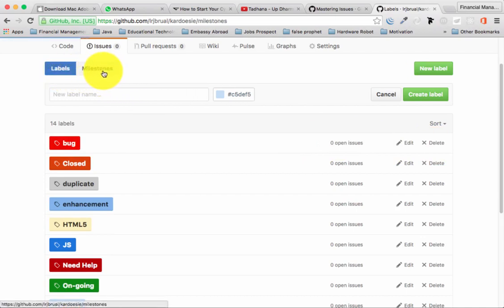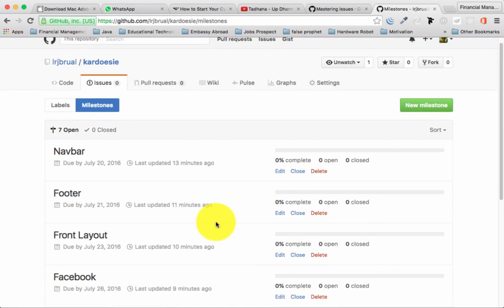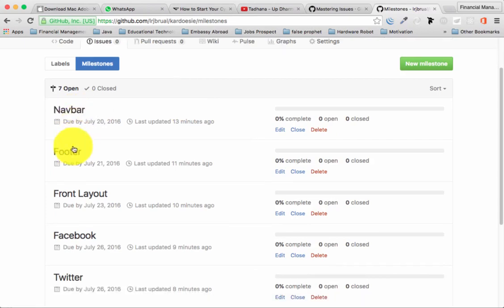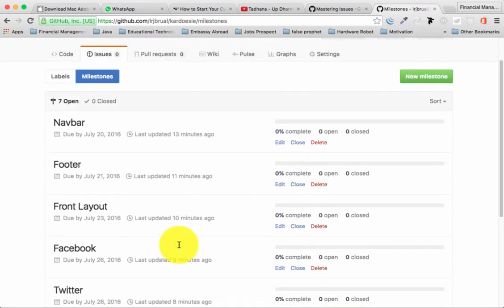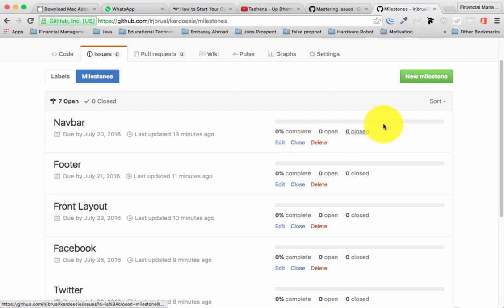Now let's go to Milestones. Once you click on Milestones it will show the ones I created for this project - I have milestones for the footer, front layout, Facebook, Twitter, and so on. Each milestone has a title, a due date for when you plan to finish, the last update date, and options to edit or close it.